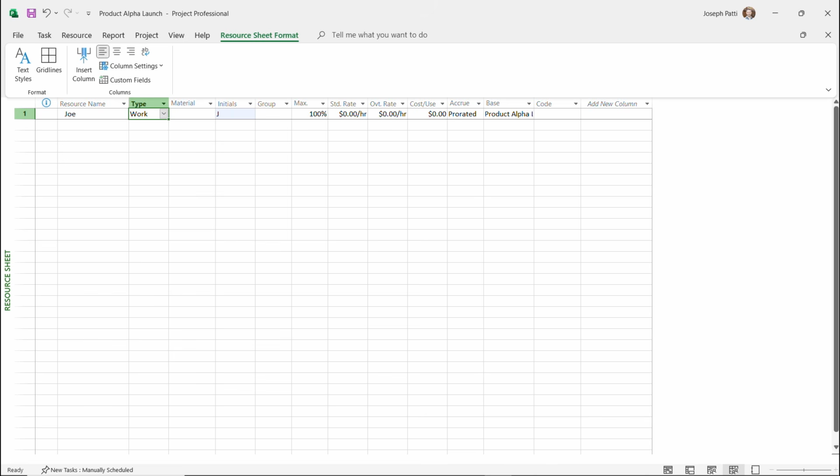I'll say that I'm working on this project 100% of the time, which means 8 hours a day, every single time that we're working on something. Standard rate for me, I don't know, you can make it up. I'm just going to put that I make on this project $50 an hour. No overtime, we won't worry about that.